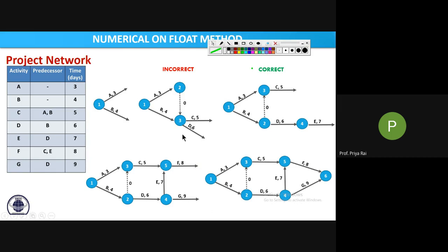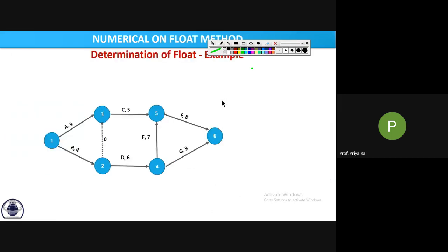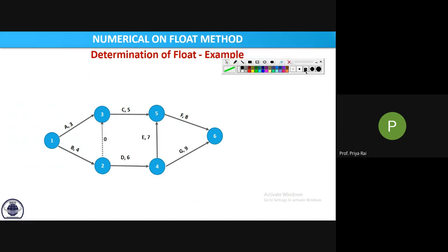Now the second is to find out the project duration. So what will we do now? They've asked you to find the project duration. Earliest. Yes, earliest start time. So we will simply calculate the E values. Now E1 will be, again we will start from 1, so E1 will be 0.